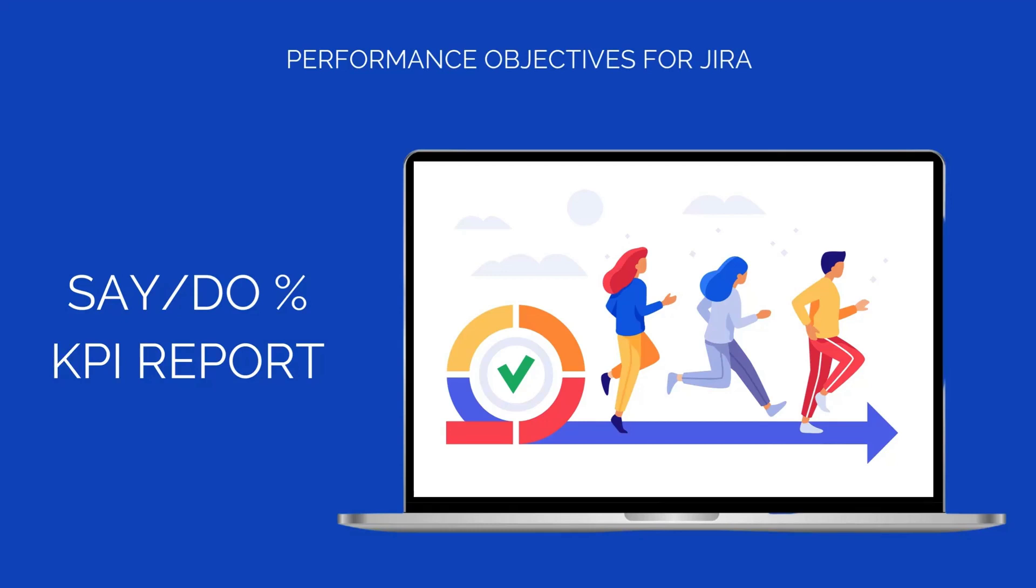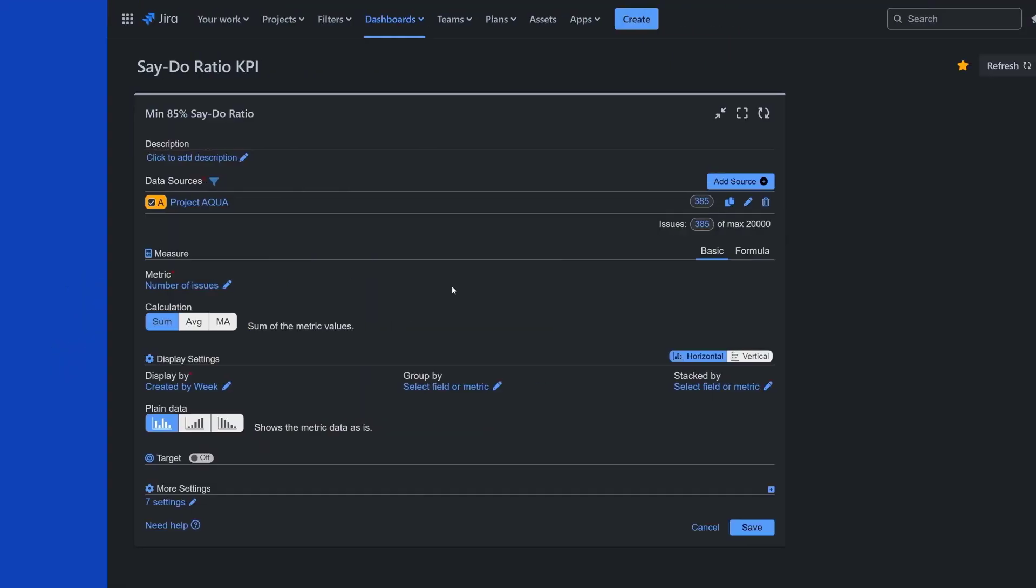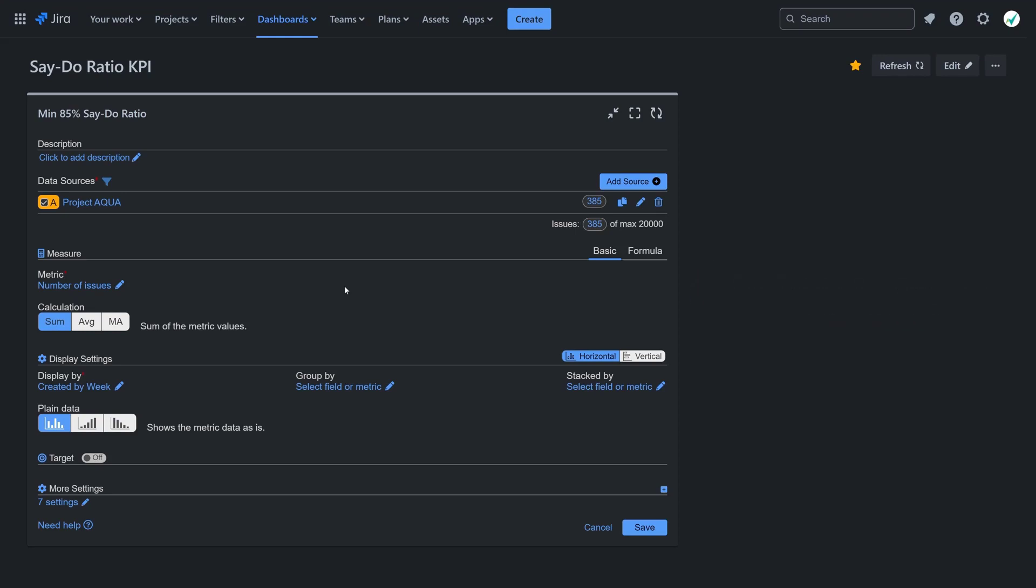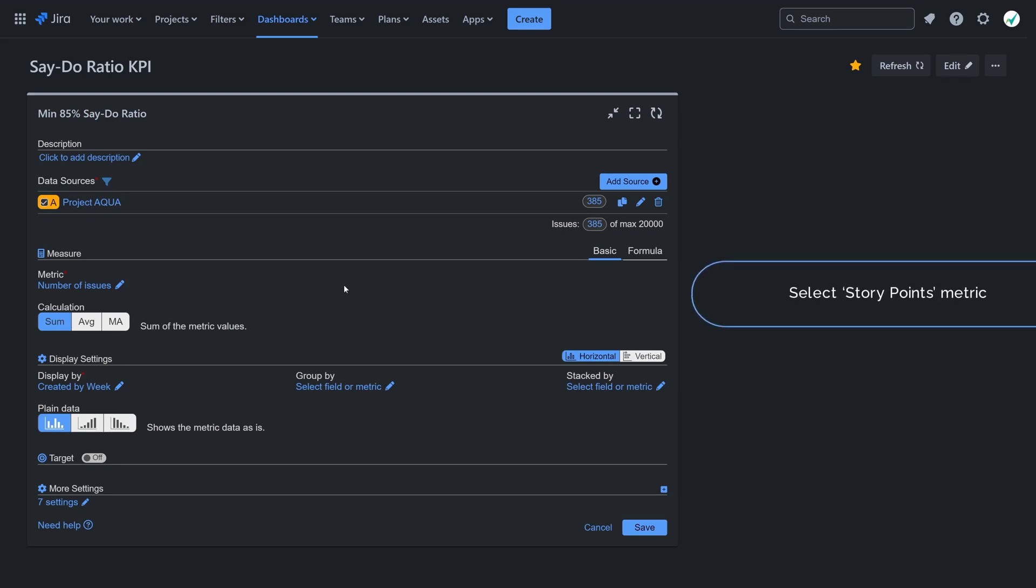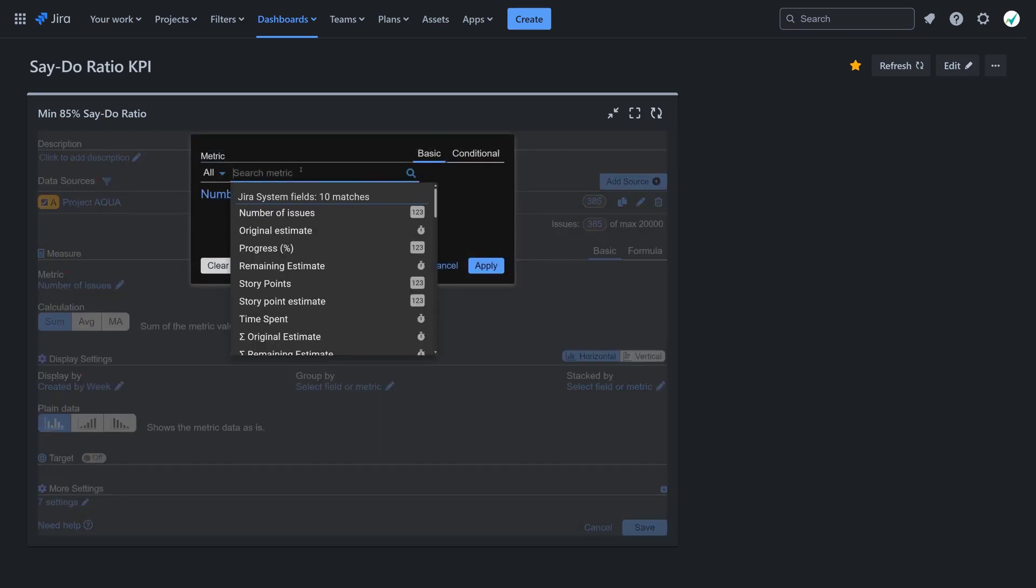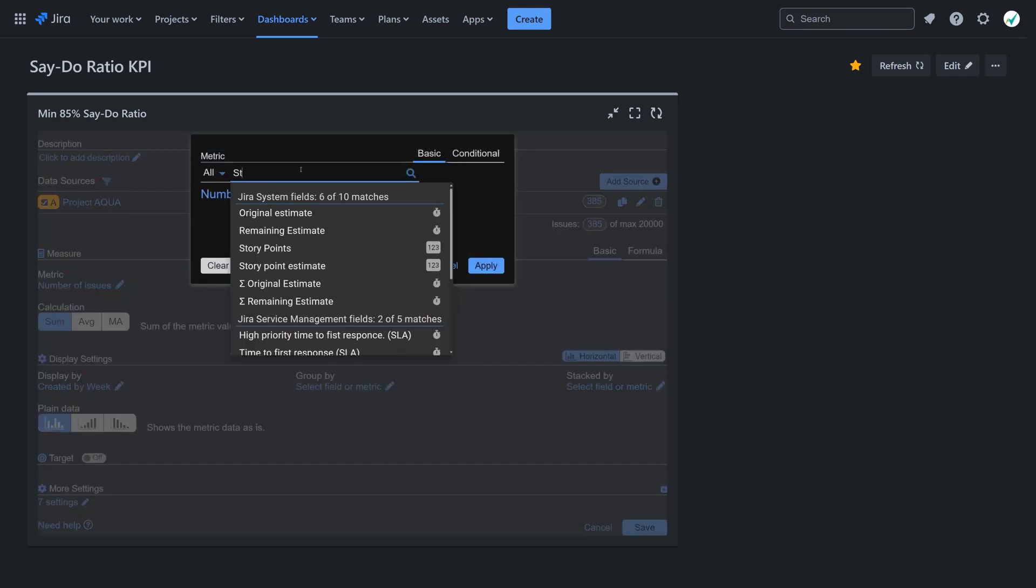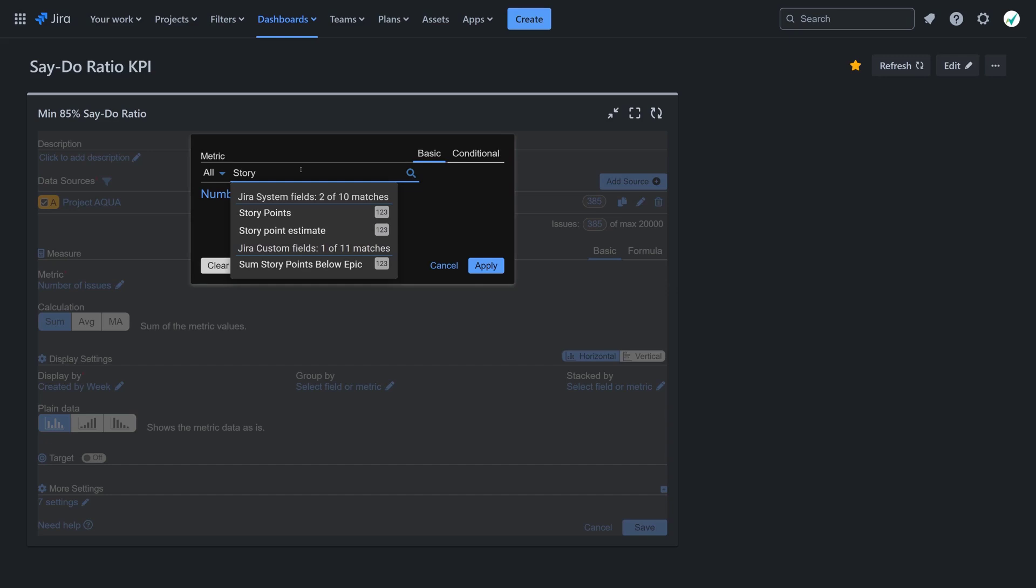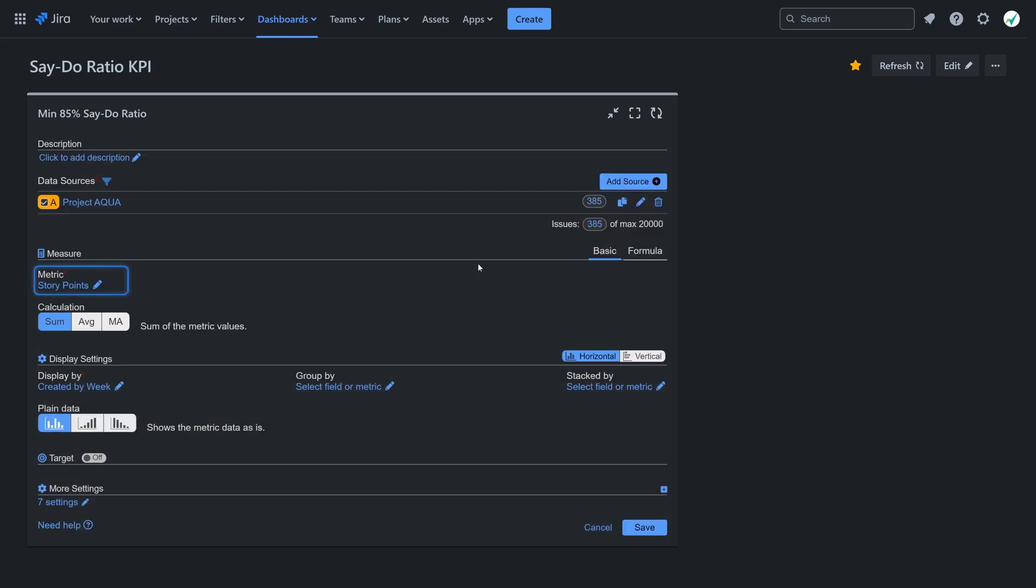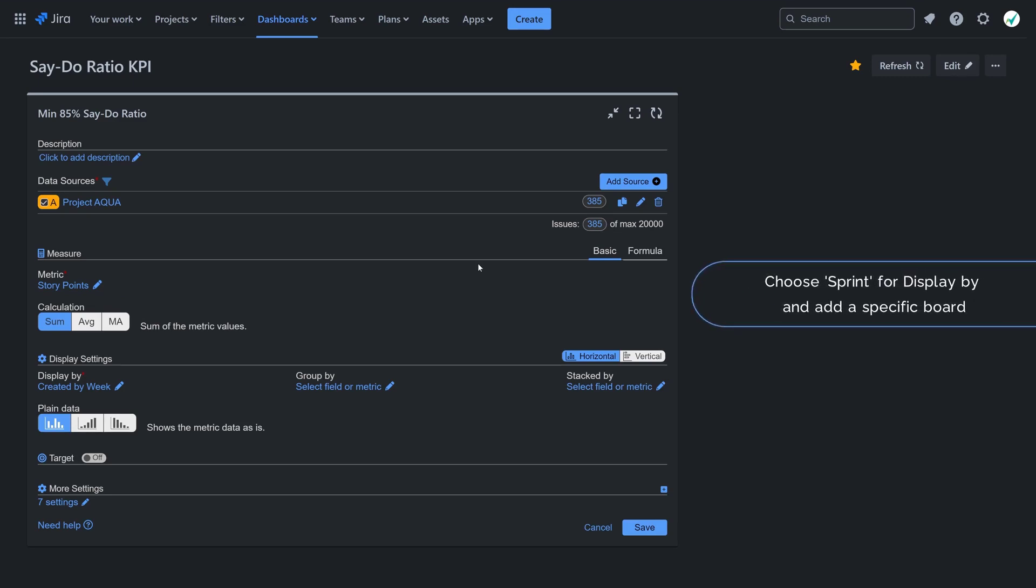Disable the date range option in the data source and set it to filter only issues from your target project. Choose story points as your metric. Under display, select sprint and pick the relevant board.